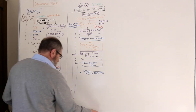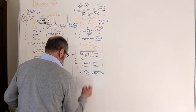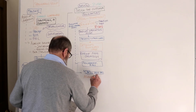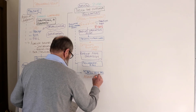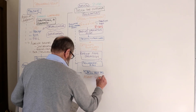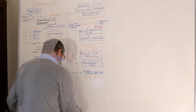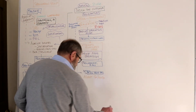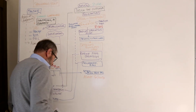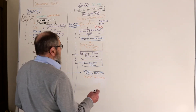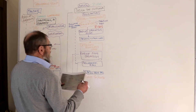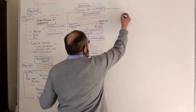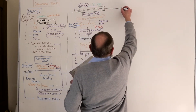At the end of designing the outcomes, we plan the next process and agree to go or not go. There's quite a bit of work in design the outcomes, which is why you need to plan for it. Once we come out of designing the outcomes, the next step is to go to plan progressive delivery — we've now got the design in place, and now we need to plan how we're going to run it.